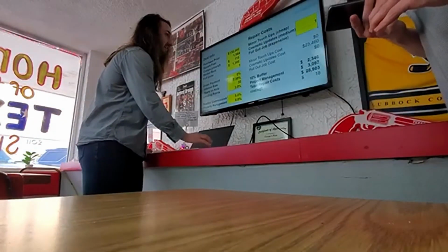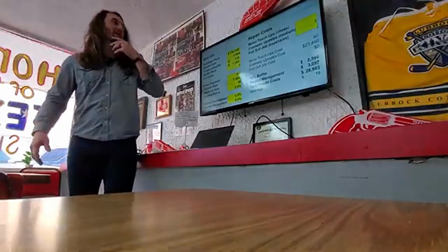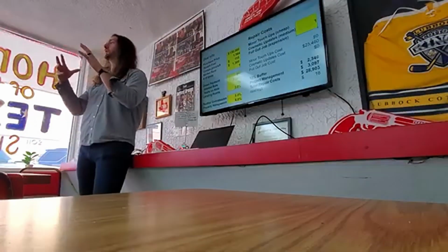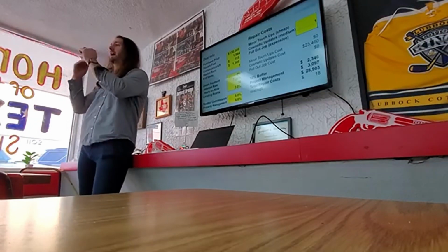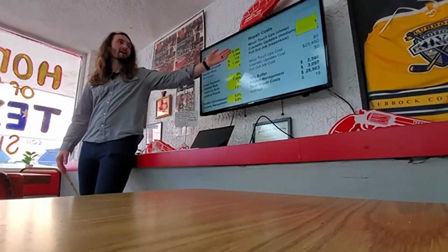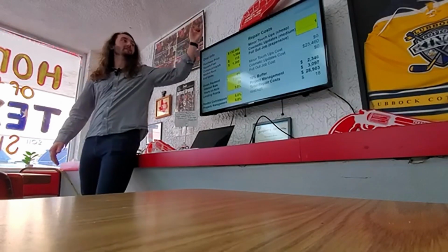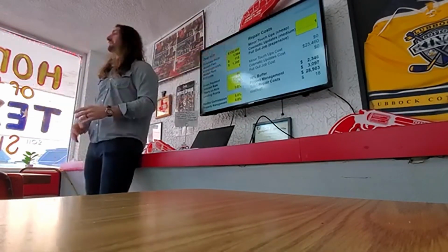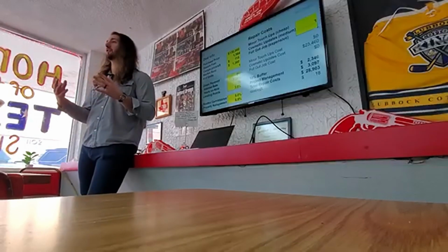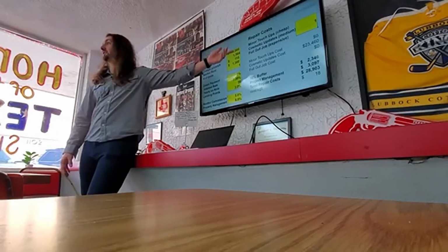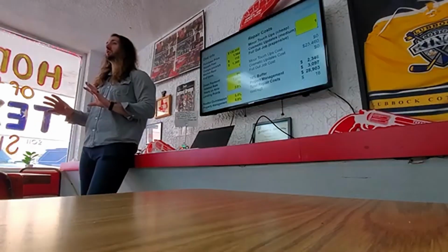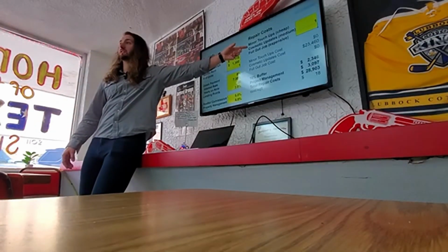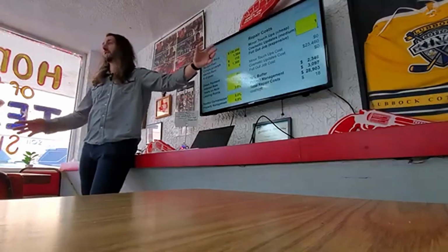So I'm gonna put a 1 here. Let me give y'all a little bit of insight on this. Whenever I put this, this is how we do just a quick analysis. Whenever we're really serious about a property, we'll break down the rehab line by line. But just for a quick analysis, we'll put a 1, whether it is minor touch-ups, super cheap, $5 a square foot. Cosmetic updates, that's just the lipstick and countertops basically, which is $15 a square foot. And then a full gut job, most full remodels are gonna fall somewhere between these two. Cosmetic is $15 a square foot. Full gut job is $45 a square foot.